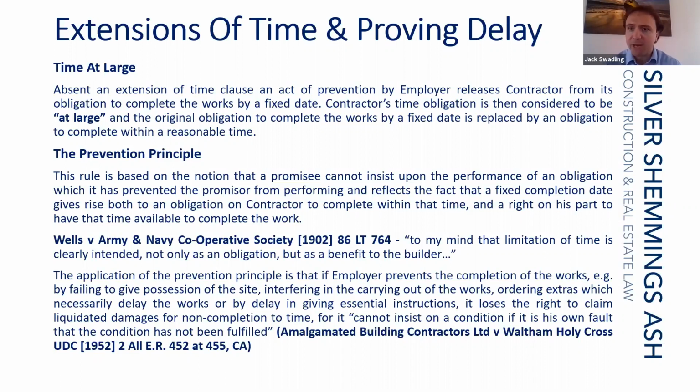And this really is a very bad situation for the employer to find themselves in, because of course a completion date is important. It gives certainty to the employer when the works should be completed by, but not only that, if time is put at large, what happens is the liquidated damages clause is displaced, and the employer will only be entitled to claim damages for losses caused as a result of the works not being completed within a reasonable time, however that's to be defined.